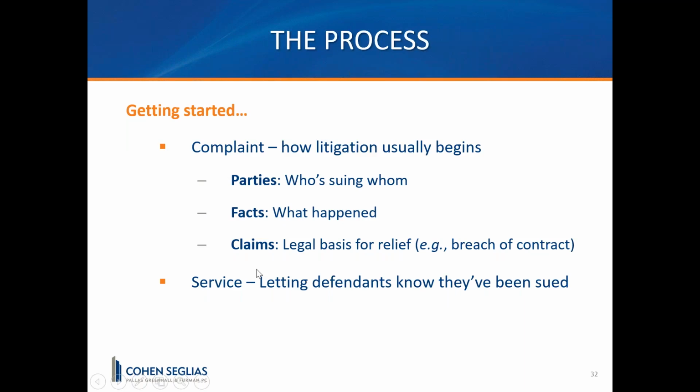But with respect to actually getting started with the litigation process, as John said, with arbitration, the demand for arbitration is usually a one-pager. It's just a summary of what the dispute is. But in litigation, you actually have to file a complaint, which is a very formal process where you have to lay out all of the facts concerning what happened, as well as set forth the legal basis for your claims,